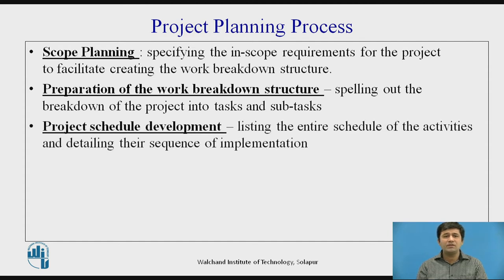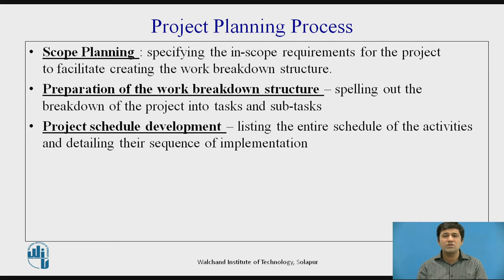Then comes the project schedule development. Once we have the major project and have defined tasks one, two, three, four, five, and their subtasks, we list the entire schedule of activities and detail the sequence of implementation. For instance, in the road-building example, each 100-meter section should have an exact date for completion and a person assigned to it, so we can clearly identify whether we are on track and take proper corrective action.